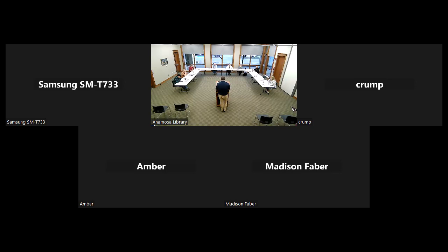We did try to locate that via several different informational sources, and nobody seemed to know exactly where it was. And there was concern that if they were to bore through that force main before they were able to make the connection with the new force main, there could be issues with that. And then change order 7 is due to the cobble and limestone. They are requesting switching from a trenchless installation method to a trench installation method to make going through the rock and limestone easier.